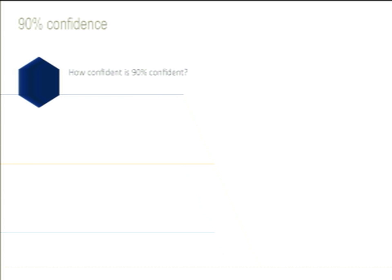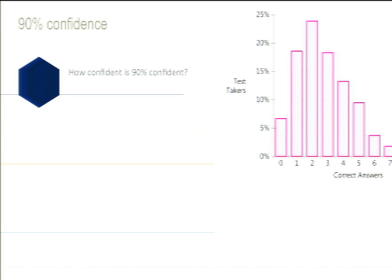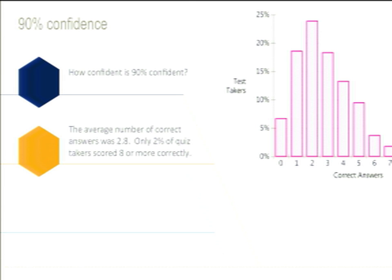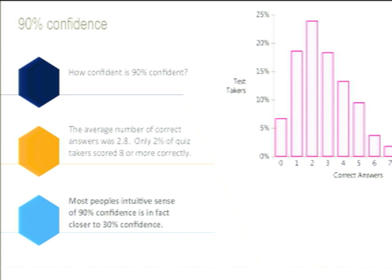This exercise has been done across many industries. They asked people 10 questions and said to be 90% confident — so you should get 9 answers right. It turns out people get nowhere near 90% right. The average number of correct answers was 2.8, and only 2% of quiz takers scored 8 or more correctly. What that means is that most people's idea of 90% confidence really means about 30%. That's why we triple all of our development estimates.